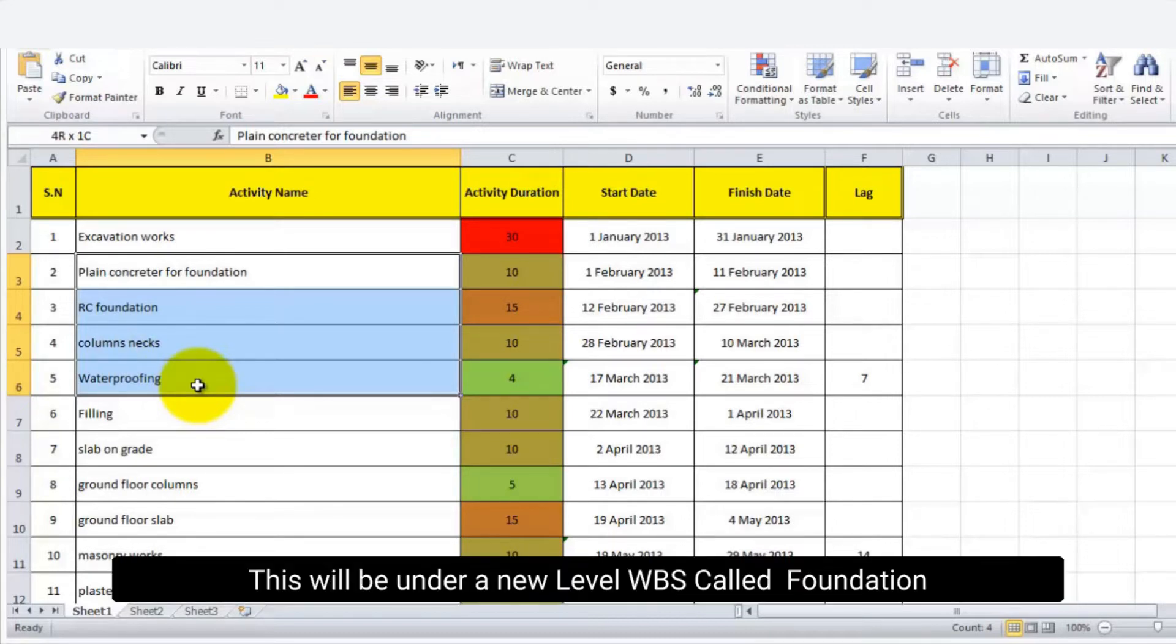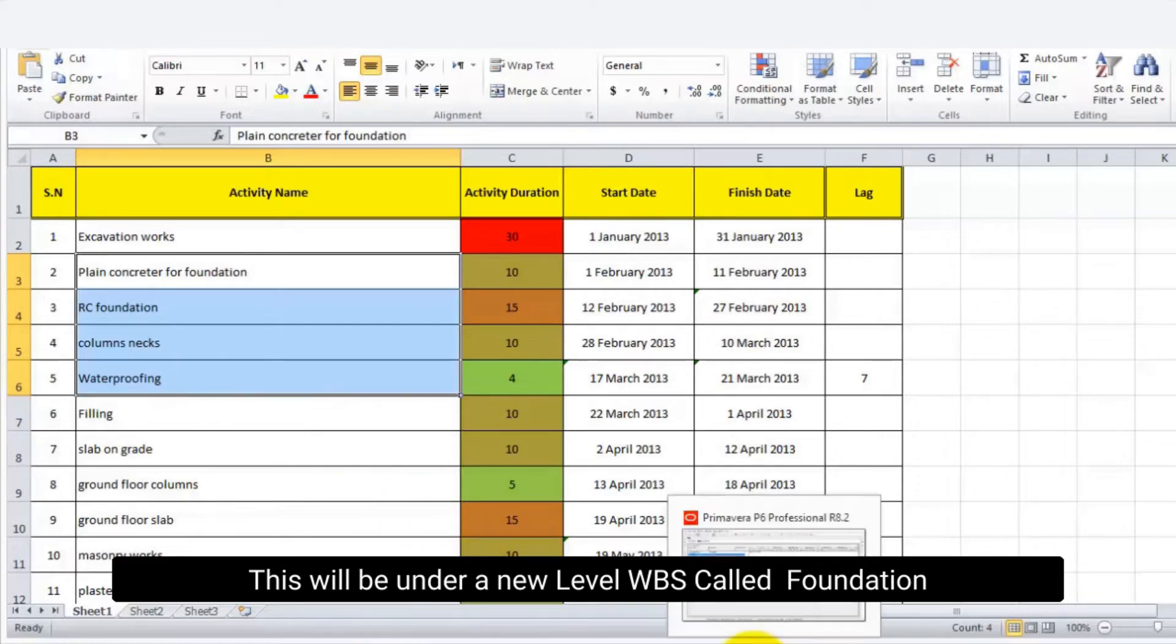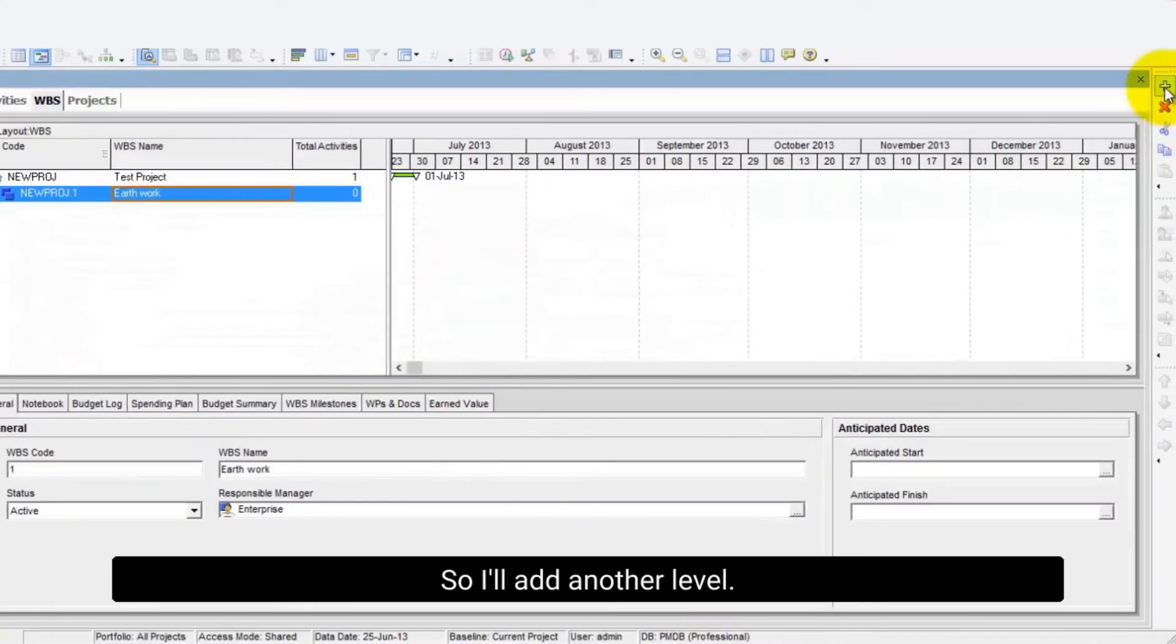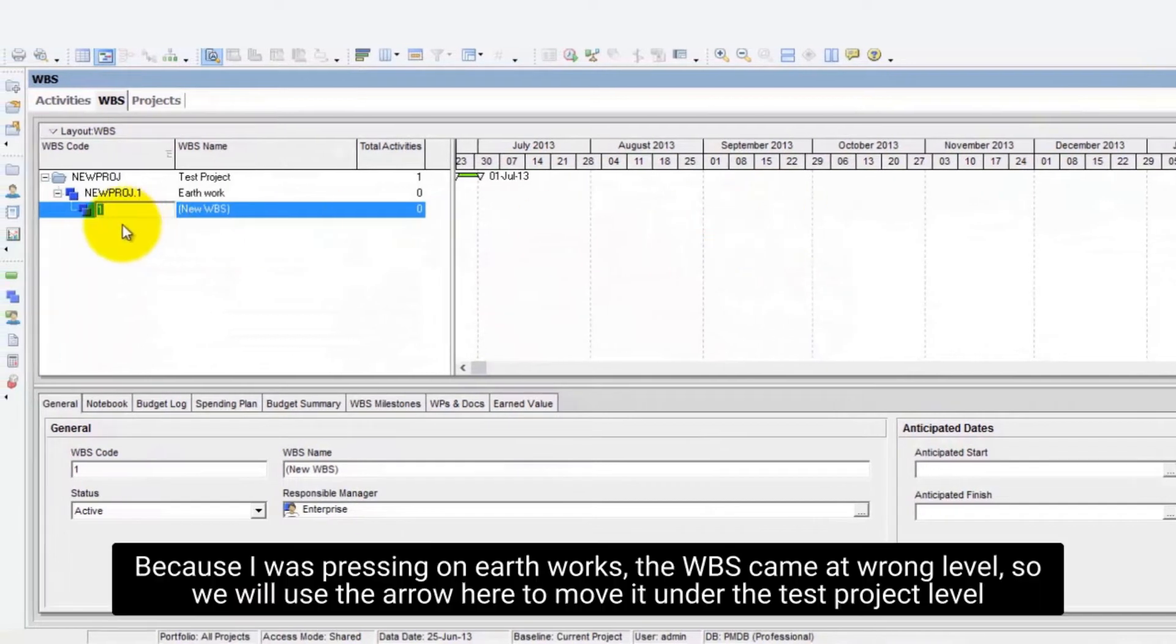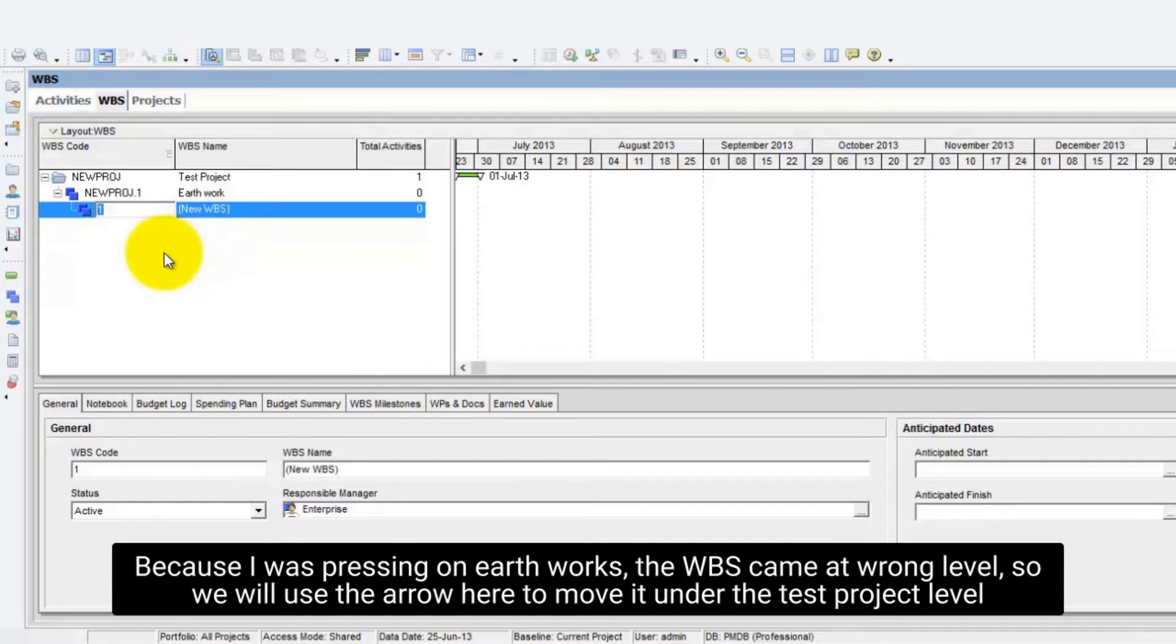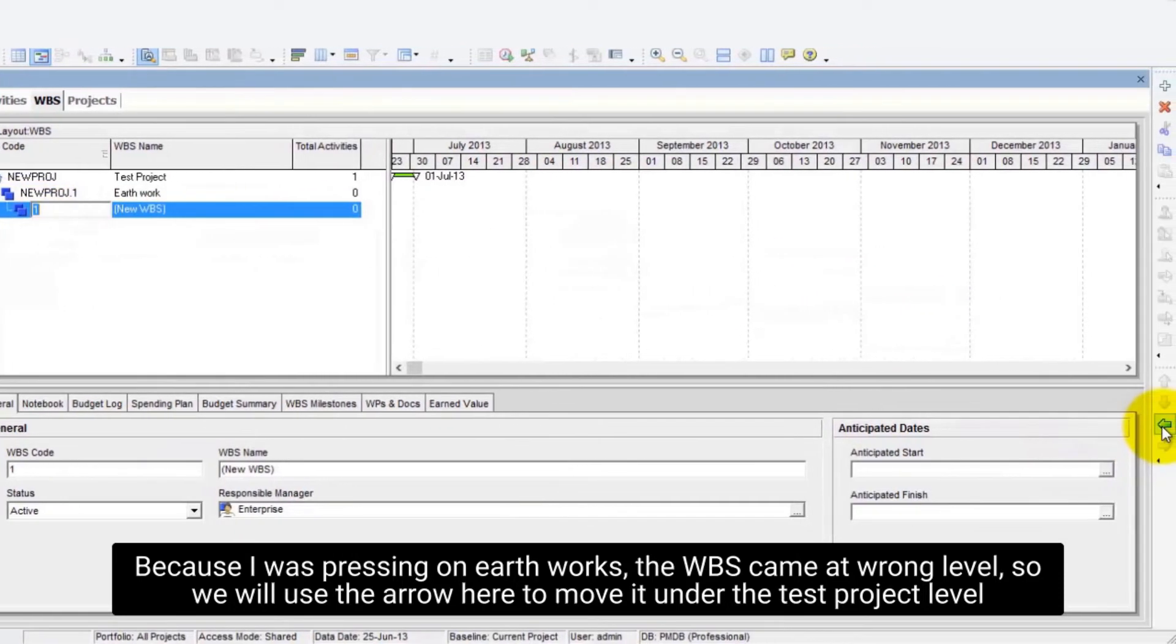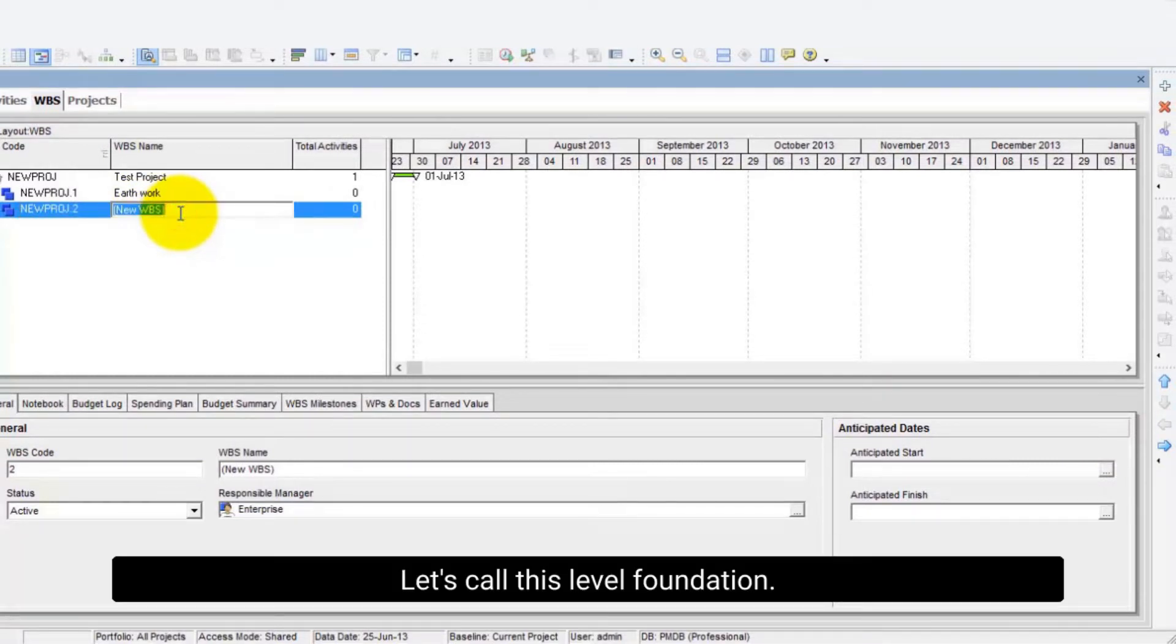This will be under a new level WBS called foundation. So I'll add another level. Because I was pressing on Earthworks, the WBS came at wrong level, so we will use the arrow here to move it under the test project level. Let's call this level foundation.